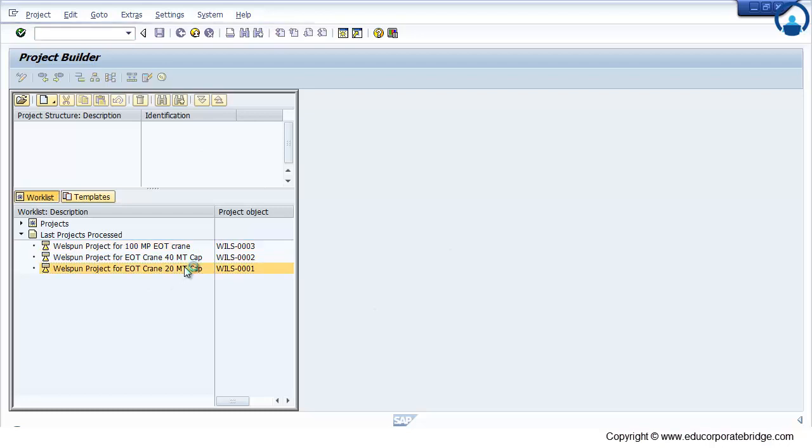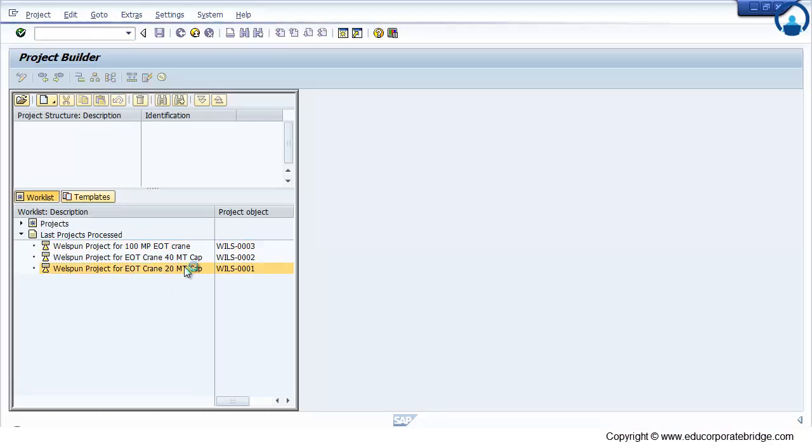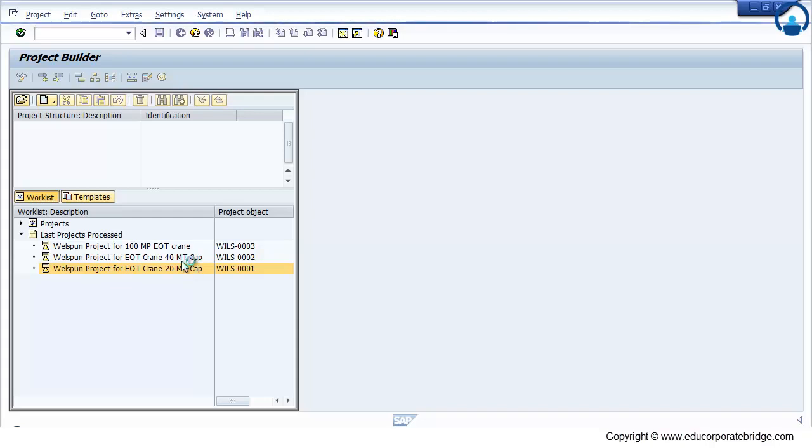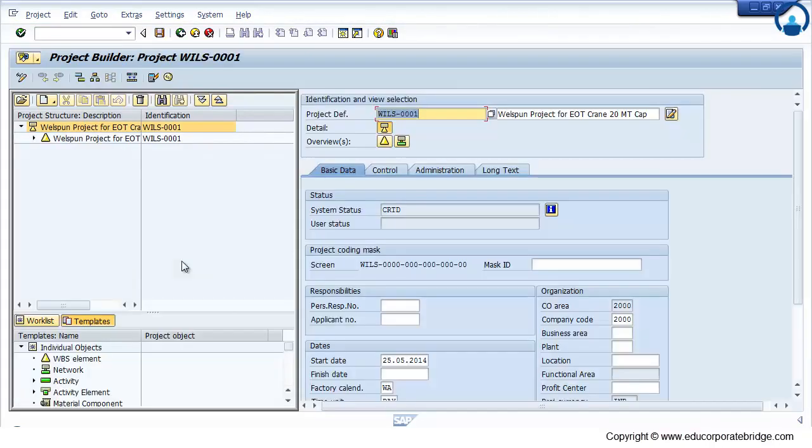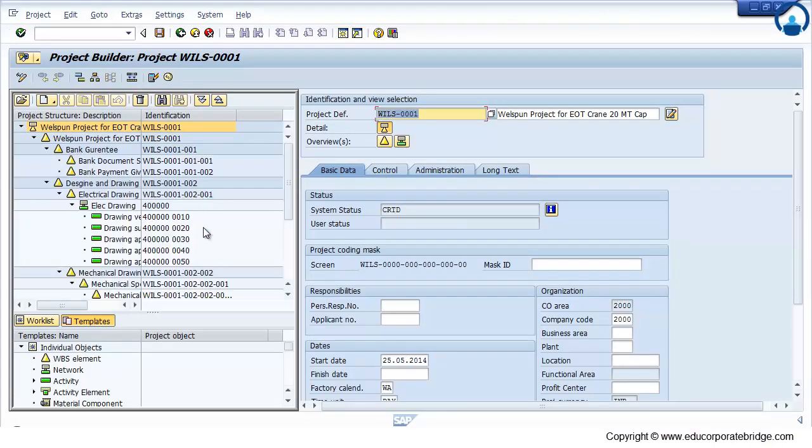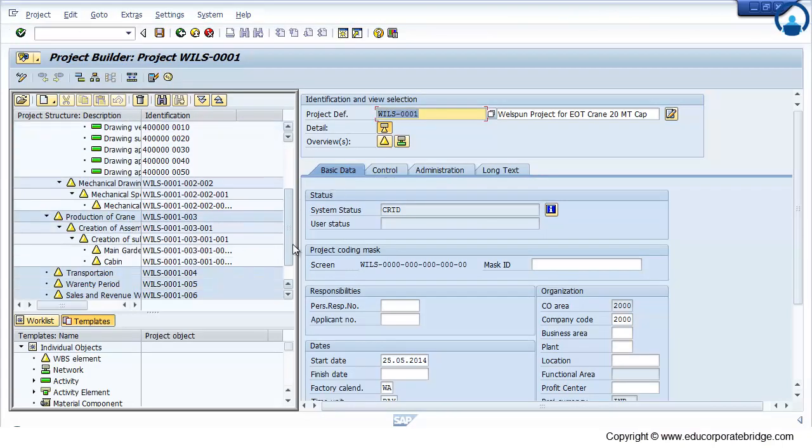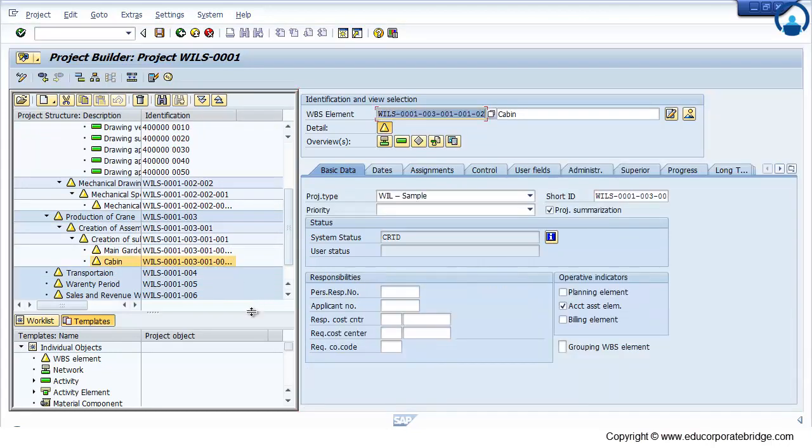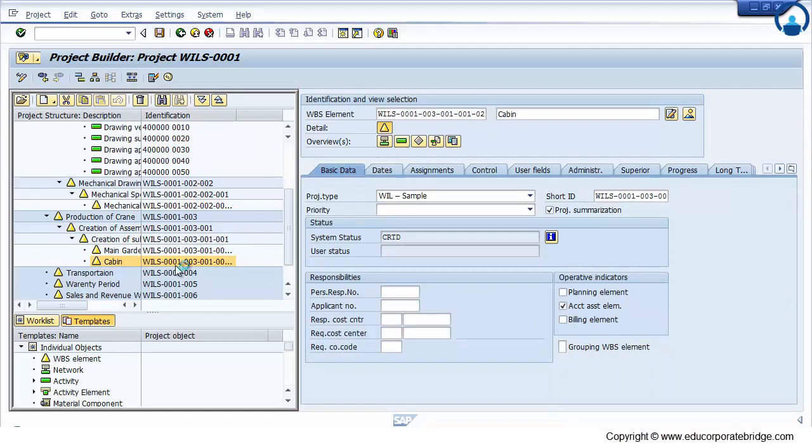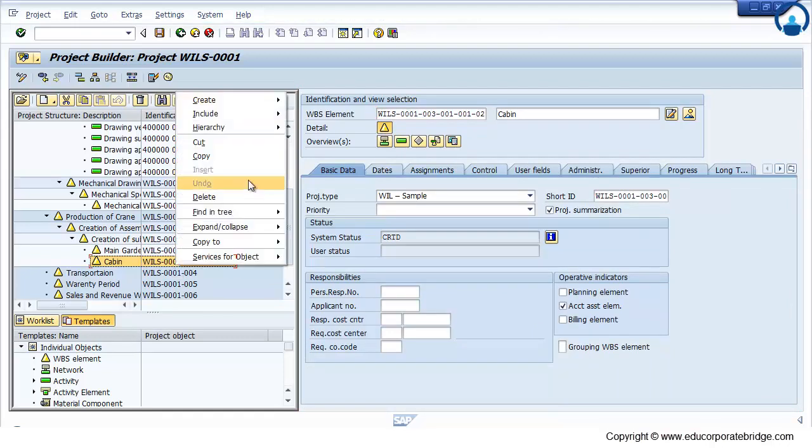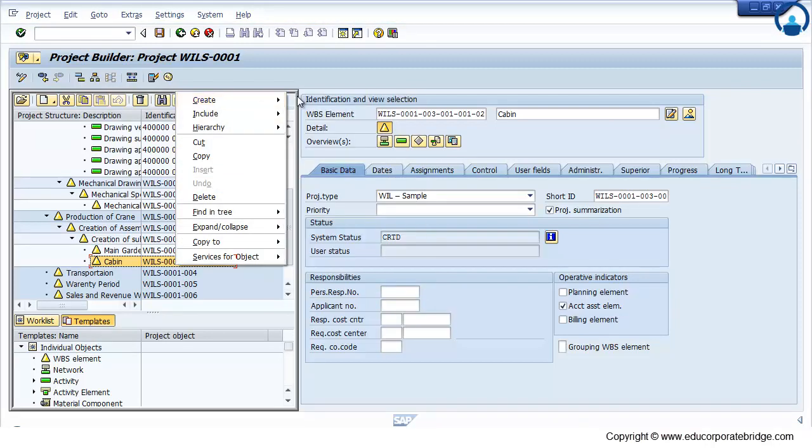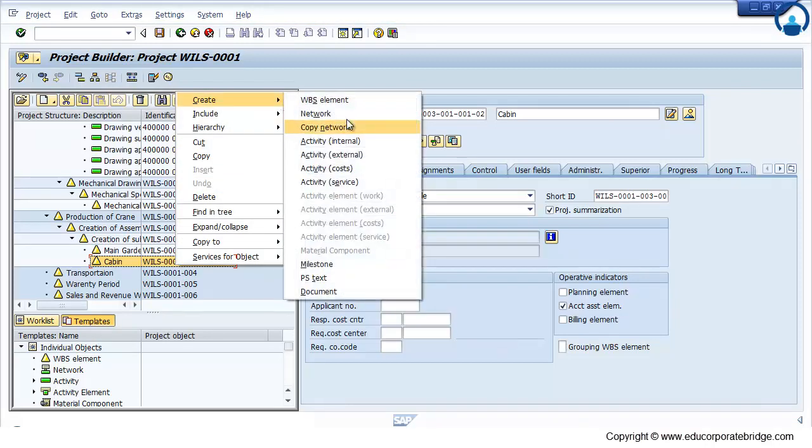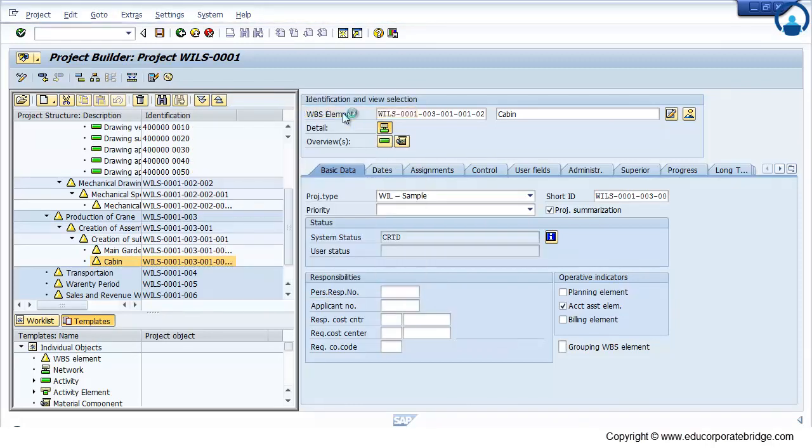Open any project. Once you open the project, double-click, select any activity. Now for example, the cabin has a WPS where I need to create one internal and one service activity. So go to create network. Just create name of the network as cabin.